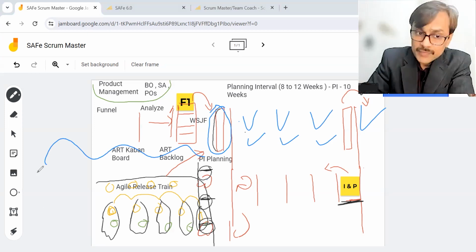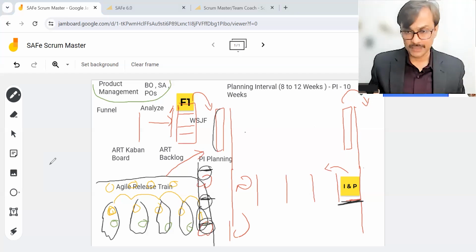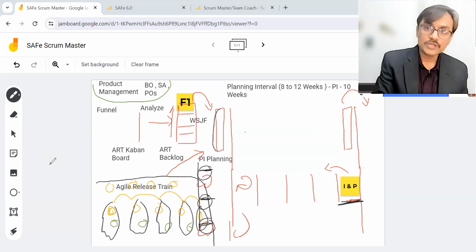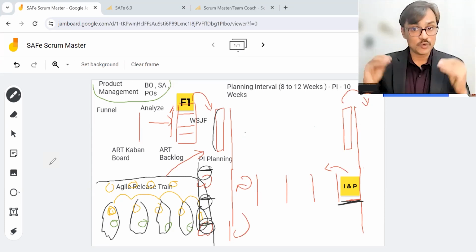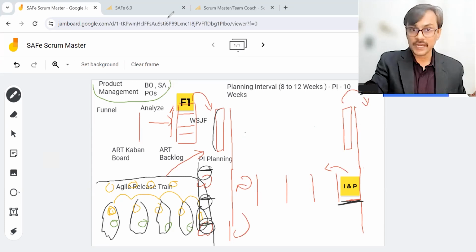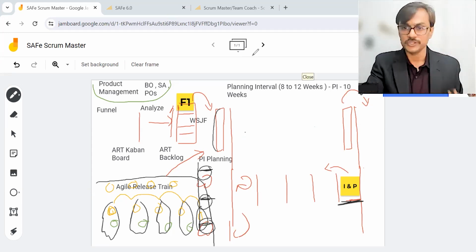So, summarizing, as a Scrum Master, I make my team ready for the PI planning meeting. To make them ready, I ensure they are putting sufficient detail and attention into the upcoming features which are expected to come to them. That's the first thing. I ensure that the product owner and the team are spending good time refining the backlog, which means dividing the features into small user stories.